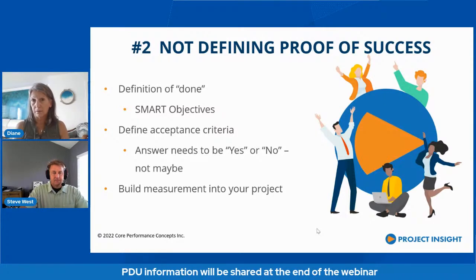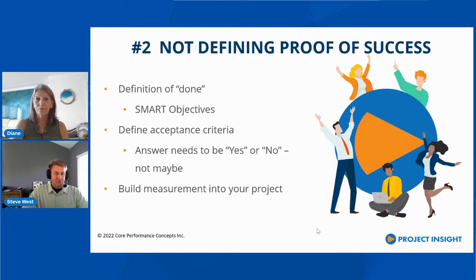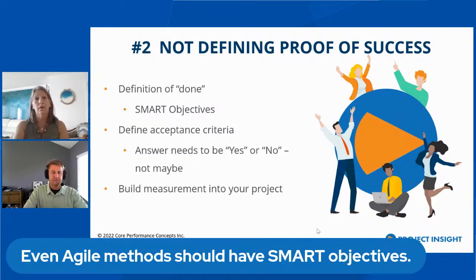What's a definition of done? Well, usually it's a release of software to production or something, but it has to work. Yeah, working software. So maybe a bug-free deployment or something like that, having a certain number of errors or less? Yep, that totally could be too. If one of the things you're trying to do is improve the delivery quality, that would absolutely be a great objective. We historically have had 20 defects every single deployment. Let's work to improve that, and you start chipping away at what you've been doing that caused those challenges.